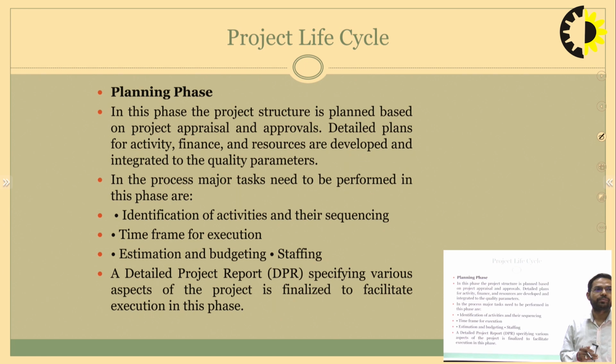Planning phase: in this phase, the project structure is planned based on project appraisal and approval. A detailed plan for activities, finance, and resources is developed and integrated. Major tasks in this phase are identification of activities, their sequencing, time frame for execution, estimation, budgeting, and staffing. DPR, the detailed project report, specifies the project.